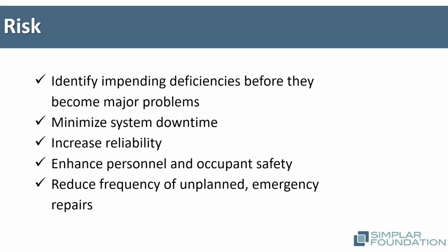And so when we get into situations, we don't live in a world anymore where we have parts on the shelf, where we have our assets that we're going to replace on the shelf. This has produced a whole new realm of risk management for facility managers. Now we need to be able to see what assets are failing 3 months in advance, 6 months in advance, 12 months in advance, just due to the supply chain issues that we continue to struggle with in this country and globally.